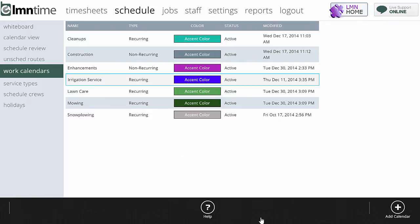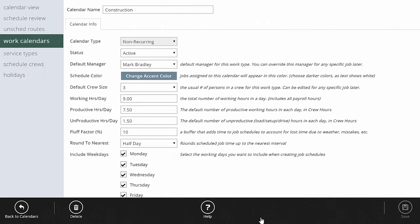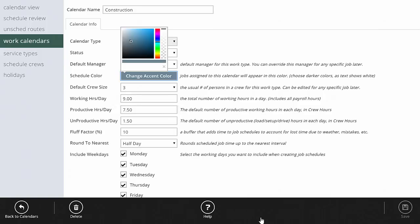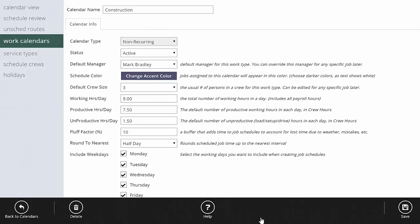Let's take a look at each one and see how they work. When you want to add a work calendar, click add calendar. For a construction or non-recurring calendar, the name is up here, and you've got a type, a status, and a default manager. So if you want to assign the construction division to a particular admin in LMN Time you can do that here. The schedule color lets you pick the color these jobs show up in on the schedule. Default crew size sets the default number of persons in a crew on this calendar, and you can change this on any job — large jobs, small jobs, you'll flex the crew size. It defaults to a three-man crew for construction, but you can change it job by job.